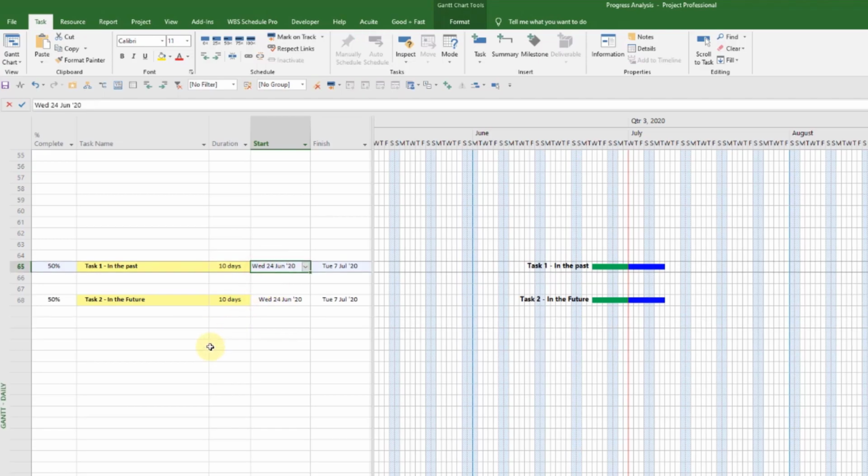And generally when work is ongoing on site, the most important things you need to know is, has the work started? Has the work finished? If it hasn't finished, how much progress is there on it? But the other thing you need to know is, when did the work actually start and when did it actually finish? Because whilst it might not be so important today, in 9 months' time, when there are other delays or arguments or disputes, when this work actually started could become quite important.